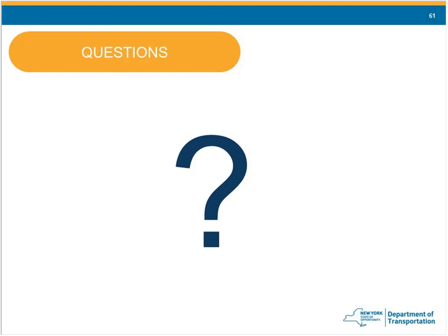But again, this leads into the next question. What if we decrease an item to offset a change order and then later we need more? You don't want to decrease items too early in the contract. But through the course of your work, you may know that you are finished with an item, especially if you have staged construction. But you should always try to get contractor concurrence on that final quantity at that time before you give that excess quantity back.